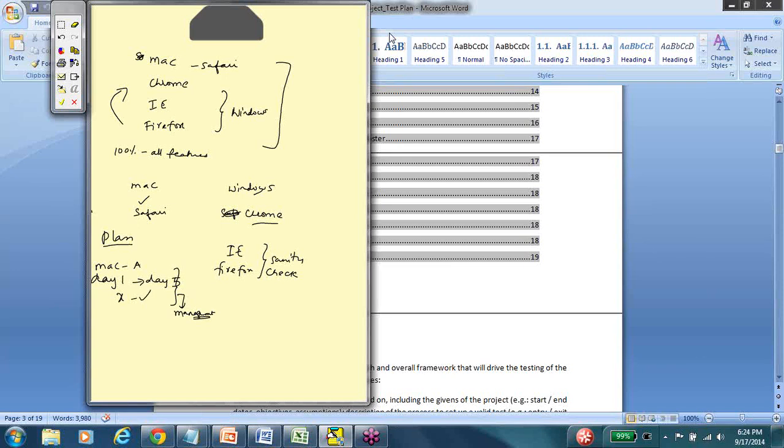So how to work is your test strategy. How do you manage the work is your test plan. So test strategy is a constituent element of your test plan. So if you just write these dates, the test plan will not make sense. It should include how you are going to apply these days to this kind of method that you came up with. So test strategy is always a constituent element of your test plan, and test plan, in addition to containing the test strategy, which is the technical implementation on how to approach testing, it will also include the managerial aspects like how to handle your work. Does that make sense? Cool.